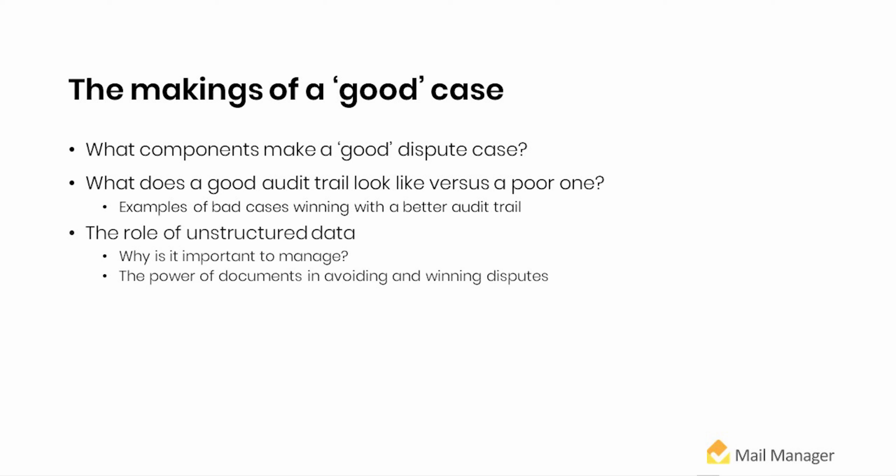And so I often speak about the importance of documents, because ultimately, if I'm going to meet with you later and talk to you about a dispute, I'd like you to have those documents top of mind. In the absence of a critical email, you may not be able to prove that you gave contractual notice. You may not be able to prove that you're within a limitation period.